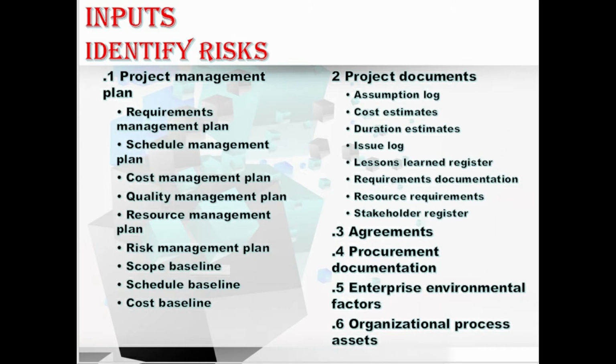Hope you understood this. And coming to the cost estimates and the duration estimates, these both estimates provide the quantitative assessments of the project cost and the project durations, ideally expressed as a range indicating the degree of risk. I hope you understood these two estimates. Moving to the issue log. In this, the issues recorded in the issue log may give rise to individual project risk and may also influence the level of overall project risk.